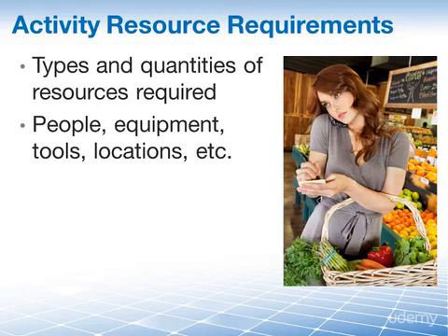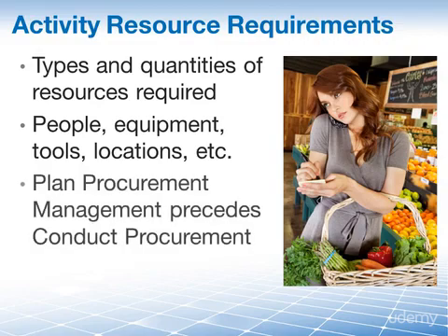But in terms of processes, plan procurement management, the process we're looking at right now, comes before conduct procurements, which means that we are going to be reviewing the activity resource requirements now in this process here. That way you know what you will need to buy, where you should buy it from, how much you should be paying for it, and other important details.